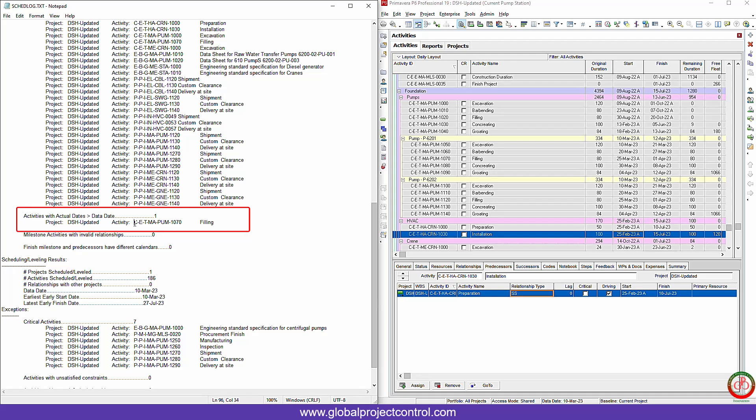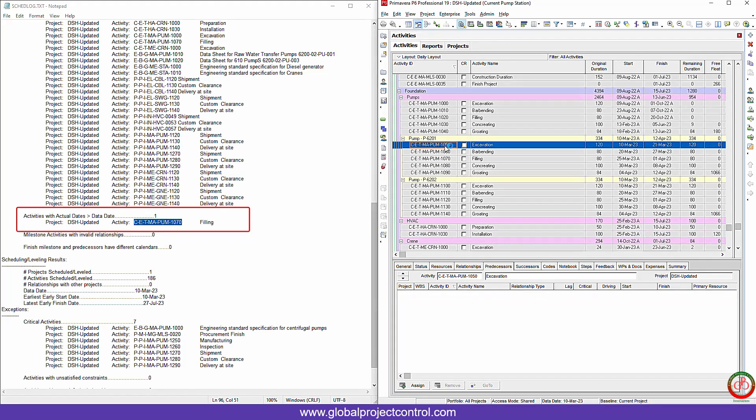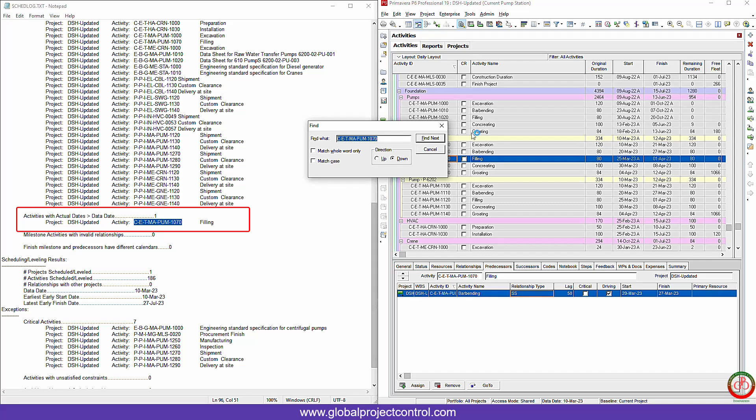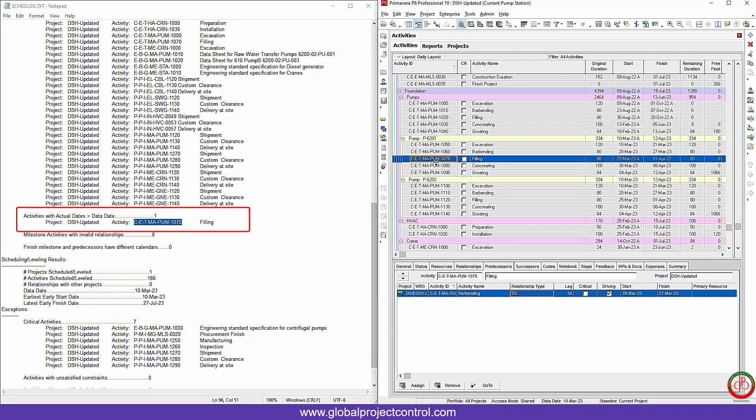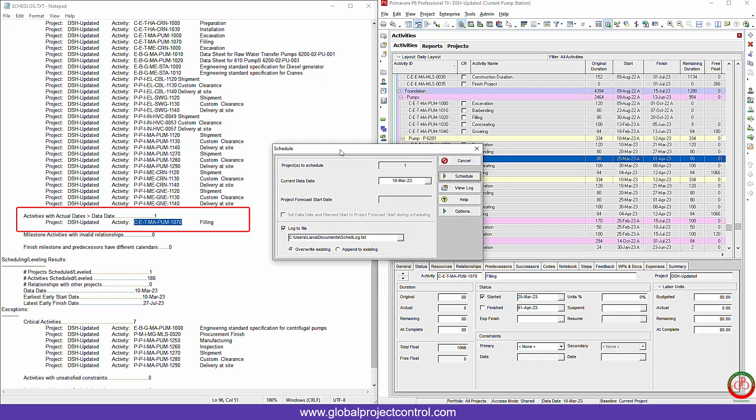If I want to proceed to this error: actual date is greater than data date. It means that we update something in the future. How does it come? If I copy this ID, search it, then you will see that it is here. If I go to the status, the start date of this activity is March 25th. If I press the schedule, you will see that the data date is March 10th. So it's not possible to update something after data date. It is in the future. In this case, it is the type of error you need to fix.